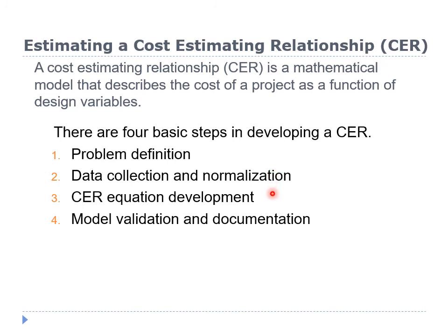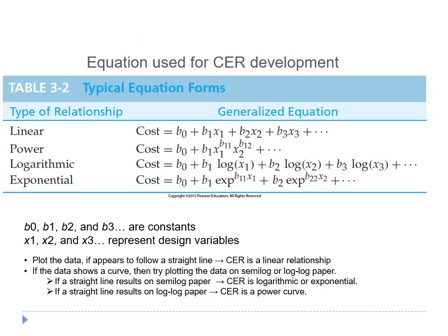The third step is CER equations development. It involves formulating an equation that accurately captures the relationship between the selected cost drivers and project costs. And the final step is to validate the model and perform documentation. Here we list 4 general equation types commonly used in CER development.